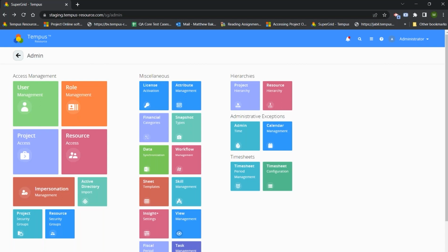So if you have your existing import files and you choose not to update them and not bring in that information, that's completely fine. If it is not there, it's going to assume it's false and treat it as a regular project or update your existing projects. So just one more option within there. If you want to import these templated projects through Excel, you can do so by adding that optional column in there and just setting that to true.